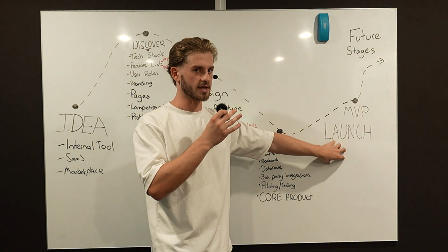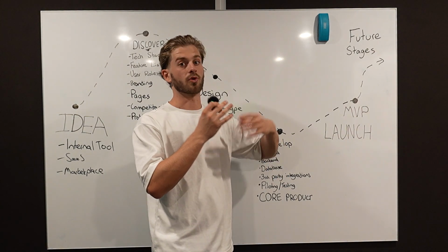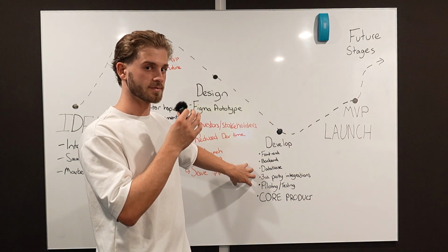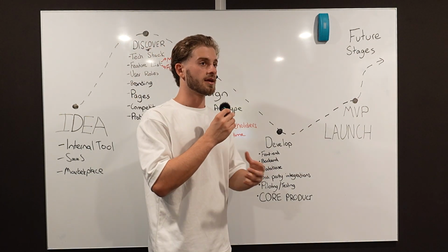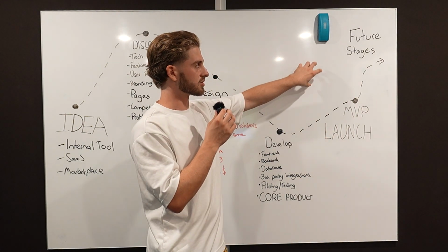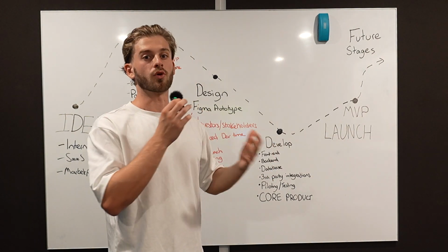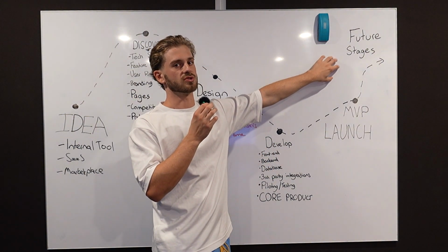And so the longer it takes to develop it, the more complex it's going to be and the more expensive it's going to be. The leaner you build this MVP, the less moving pieces we have to connect together to get your product to launch. And in turn, what we can do is we can get you a nice stable product for launch, and then we can slowly phase your other features on with a proper testing and deployment process in place to try and minimize the number of bugs and issues that you have in your app.